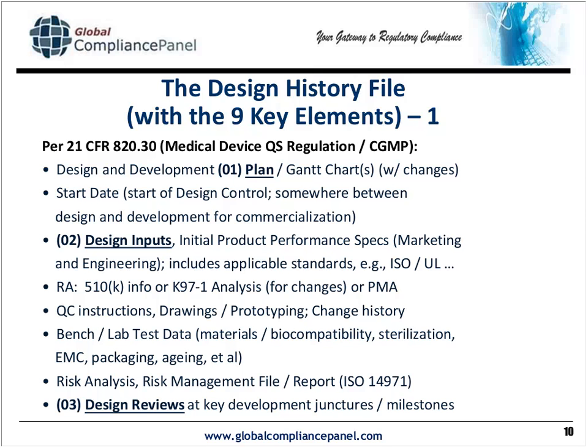As you'll notice in this element here, the first element is to have a plan. And the plan should actually define how you're developing this product. It may be a living document. I would urge you to consider it being a living document that is under change control and is changed or revved periodically. And I usually include all the revs in my design history file. That's me. It's up to you.